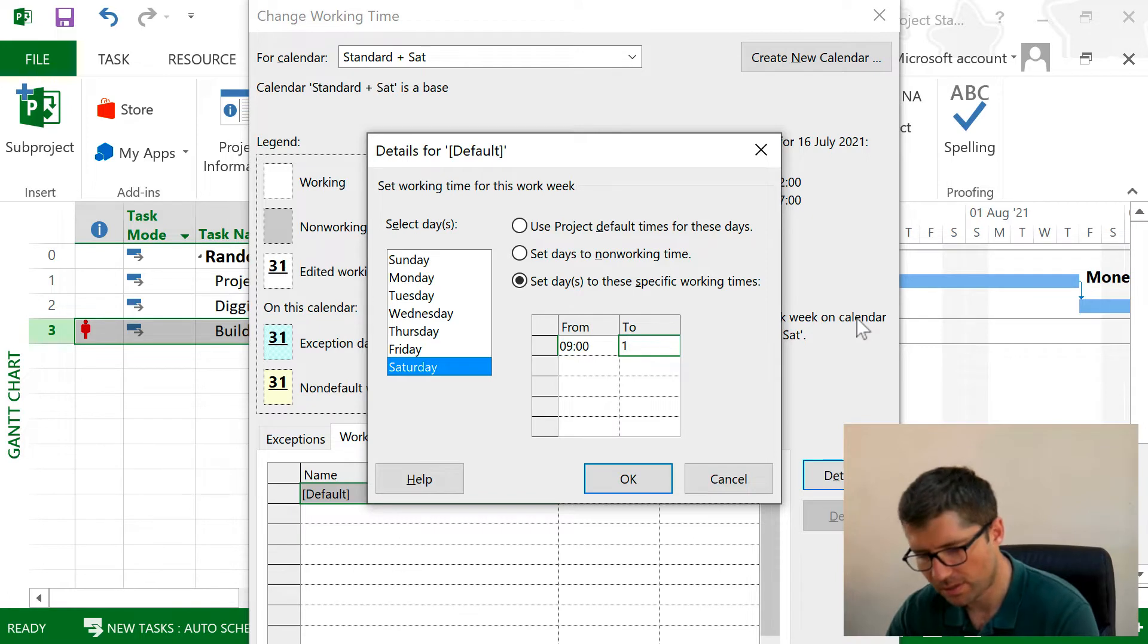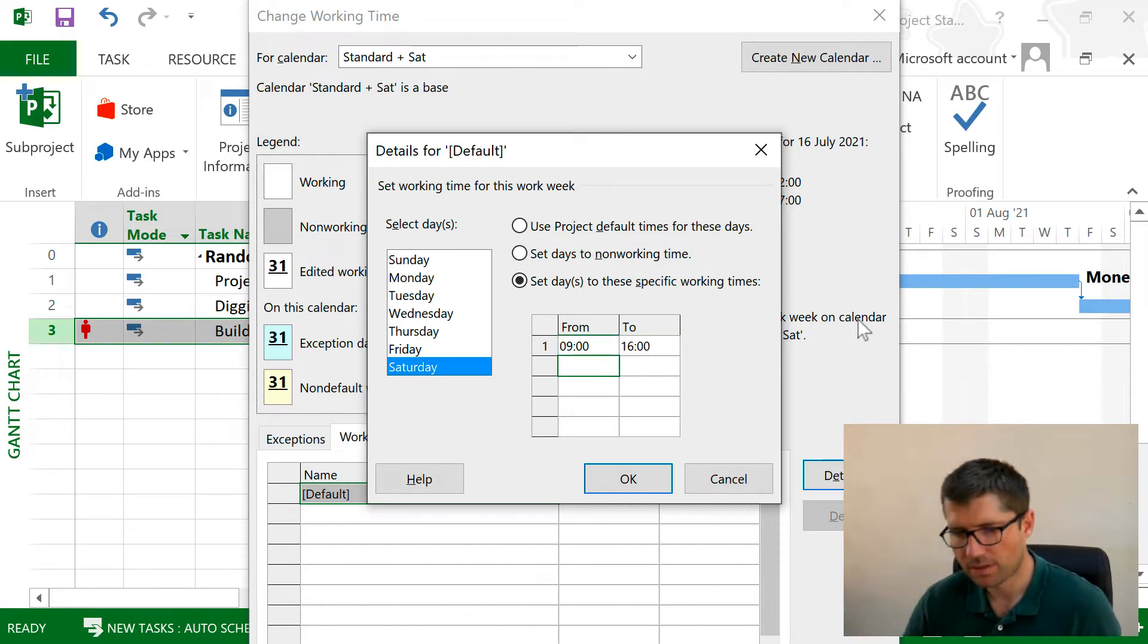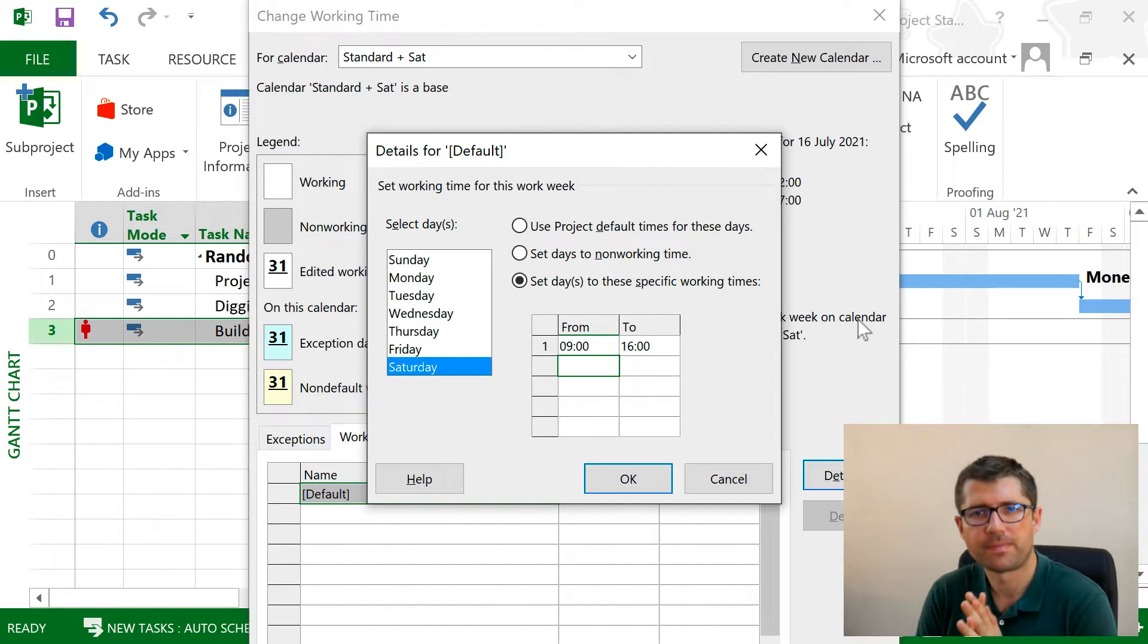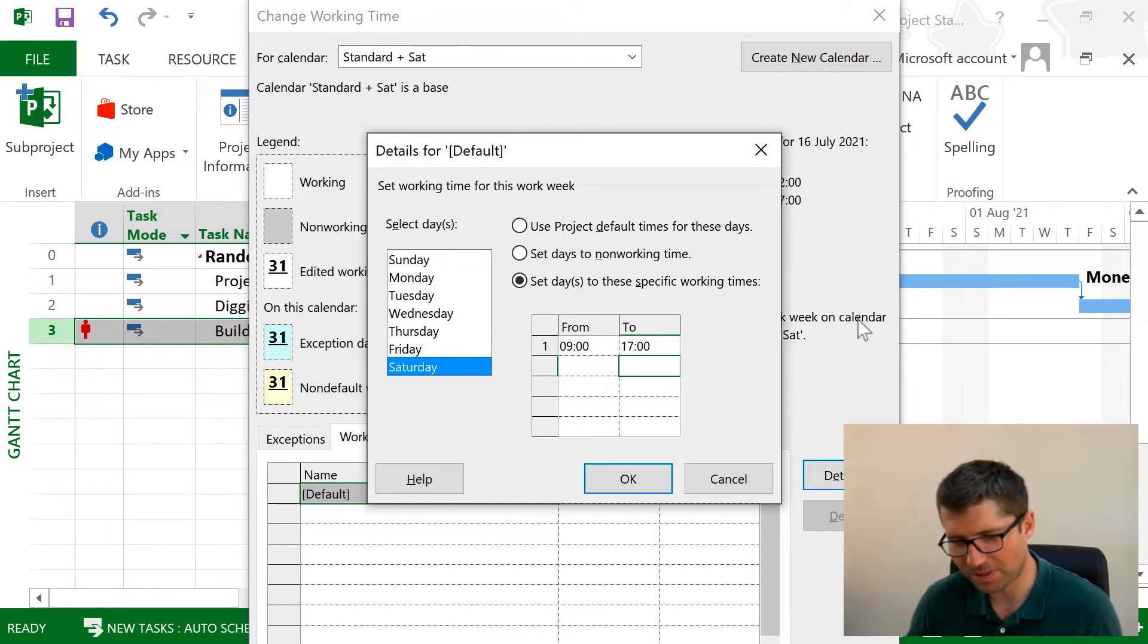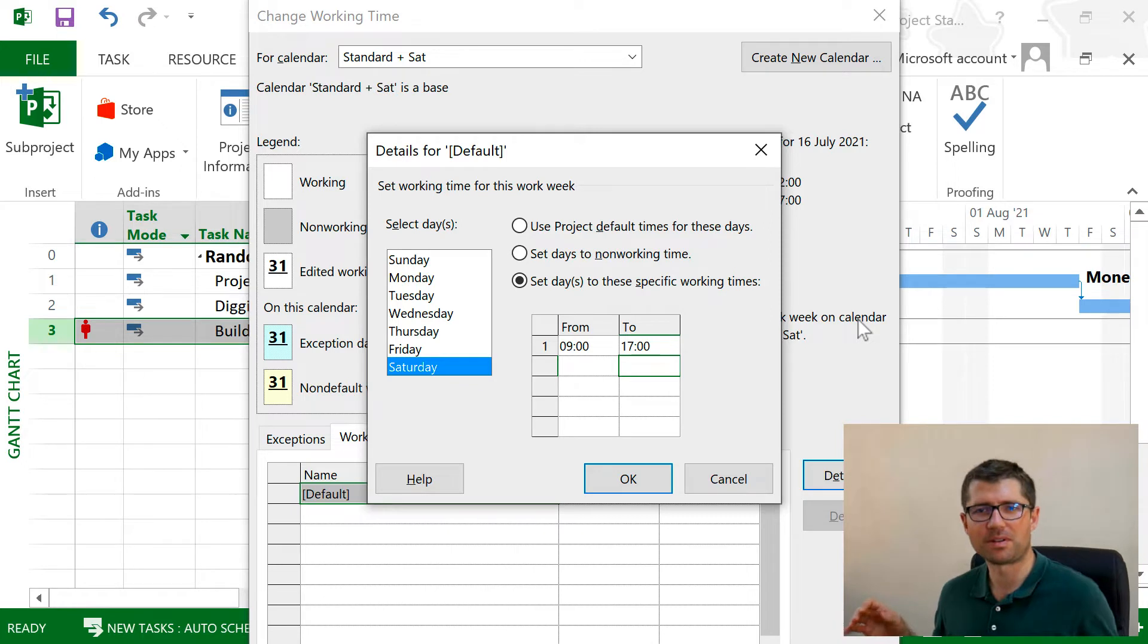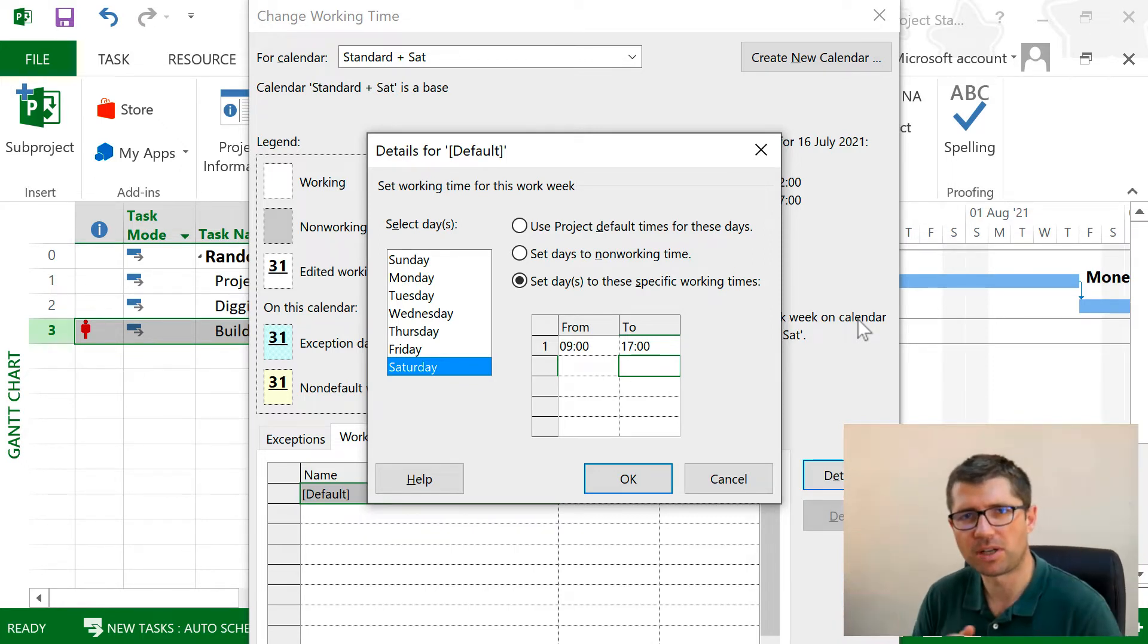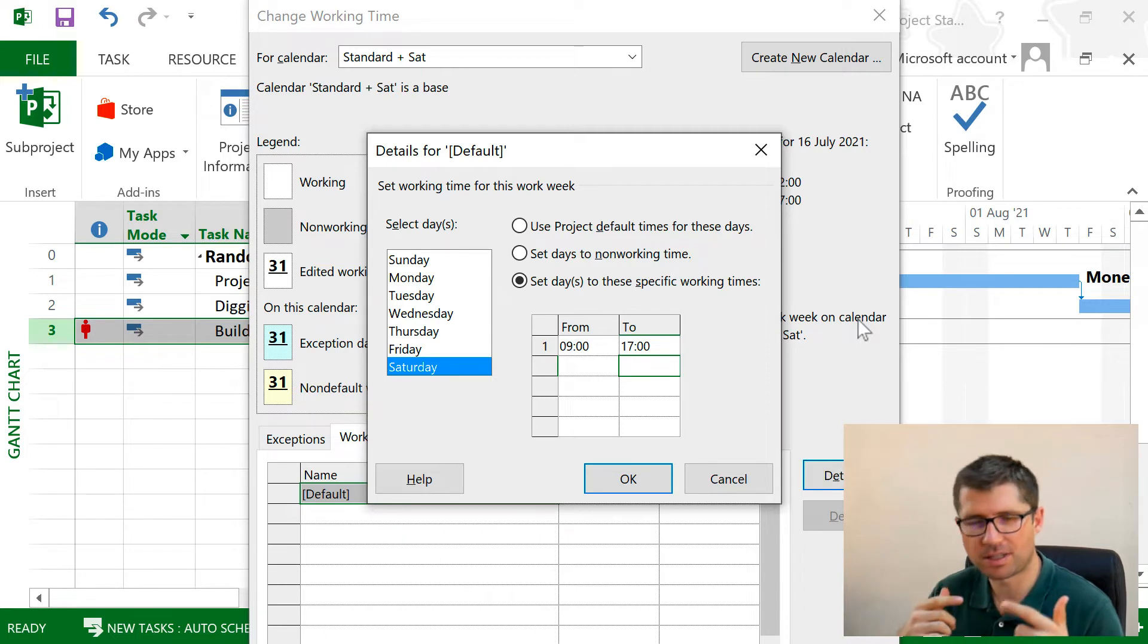For example, Sunday should be off, but I'm gonna say Saturday I will be working from 9 to 5. Eight hours is 9 to 5, no break, no nothing. That's the schedule that I'm setting here.